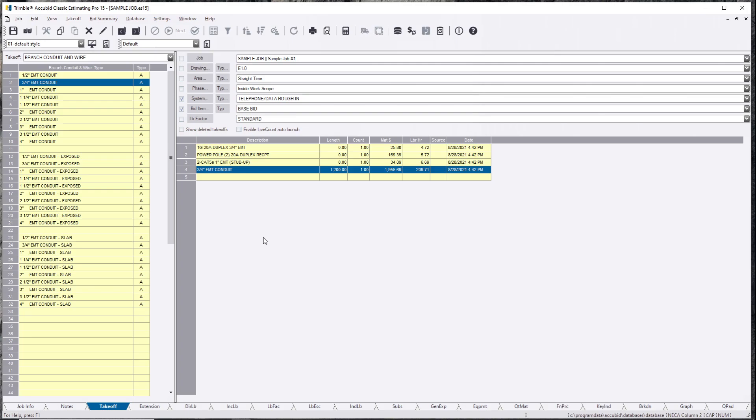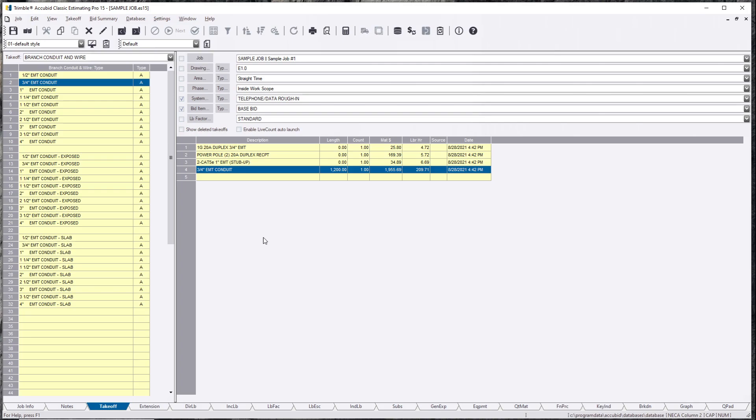You jump back to the new one, look at the floor plan, and if you take notes on your previous jobs where you were seven of eight and nowhere near the low bid, well now you could go back and be like, 'All right, well, if I jump this, if I bring this down to just my most competitive bidding and I impact just a few items that I know are going to be more difficult to install, see how you compare.' I would most definitely take that new methodology that you learn and apply it to the next job, and you will become more competitive.